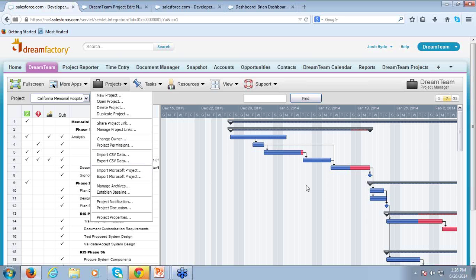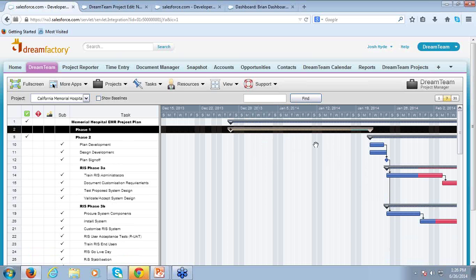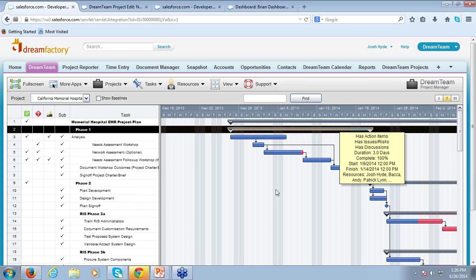Next question: within view mode, can you hide tasks that are internal? There's really no way to suppress tasks on the Gantt chart. The one thing you can do is group them together and minimize a summary task — for example, click to minimize Phase One so it doesn't display. But there's not really a way of making individual tasks invisible. You could certainly create a report in Salesforce or DreamTeam and edit that report to show only what you want, especially if you want to share a filtered view with a client.